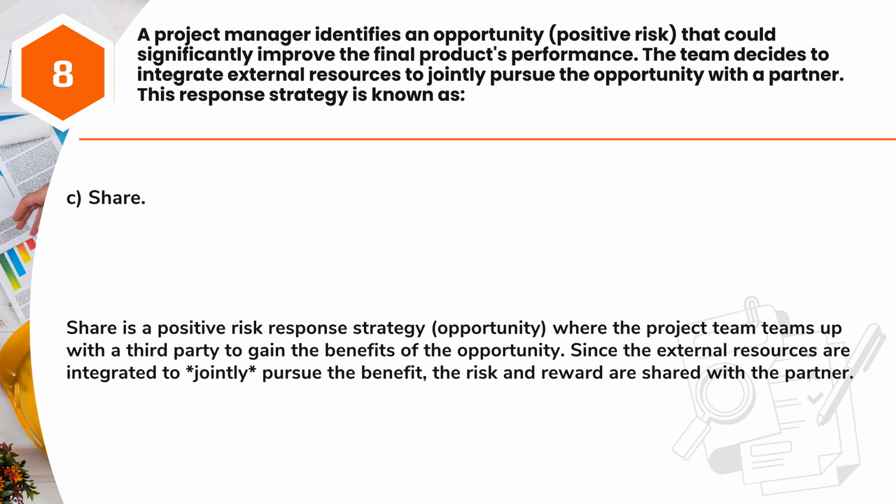Answer: C. Share. Share is a positive risk response strategy opportunity where the project team teams up with a third party to gain the benefits of the opportunity. Since the external resources are integrated to jointly pursue the benefit, the risk and reward are shared with the partner.